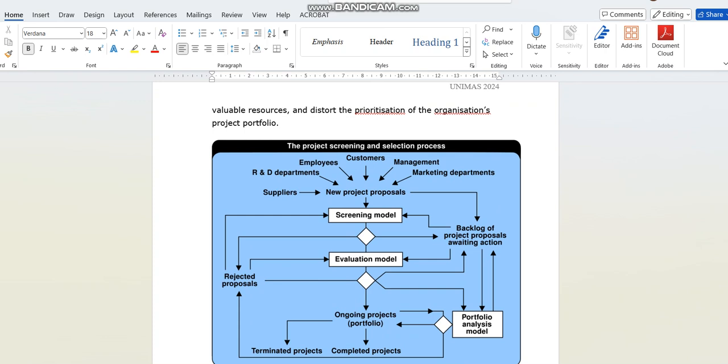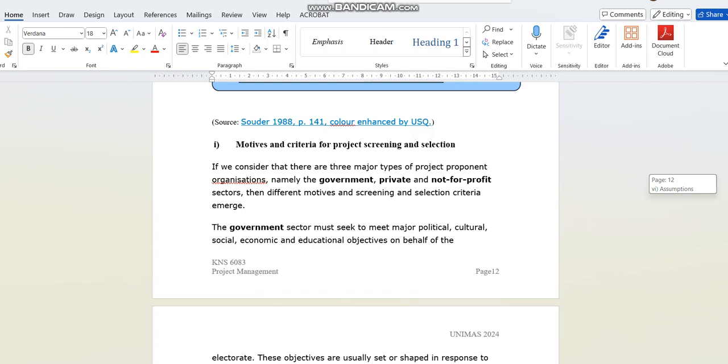We still can decide that we're not going to do anything here and let it be, let the project go on. But we can study and realize that by confirming it or by proceeding with it, you may get more benefit than cost. So you need to study. Essentially, project screening, we're talking about cost and benefit. And this cost and benefit, again, can come from the direction of some monetary values or other non-monetary units, like health, legal, law, media, corporate image, all sorts of things, okay?